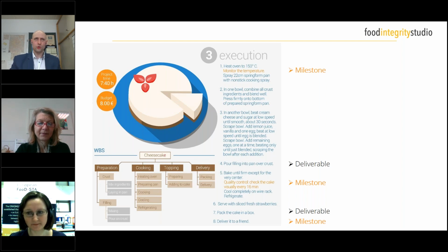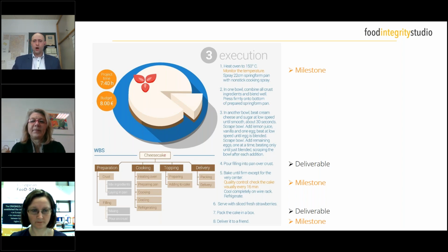You start with a plan. You can do the planning only on the basis of the information you have. So in case you're expecting more friends, and you know from the beginning that the number of friends might vary between 12 and, I don't know, 15, then you either have to see if you want to produce a bigger cake from the beginning, or you buy enough resources to cook more, or you decide, in this case maybe a bit of an unfair way, that in the end you do a controlling before you cut into 12 servings, and ask your friend, so now do you already know, will it be 12 friends or 15 friends? And if there is an update, then you can update the objective and cut the cake into 15 pieces, for example. If this is something you don't know at the beginning, for example, if it's clearly communicated that it will be 12 friends, and during the course of the project it turns out that it will be 15 friends, then you have to change everything.